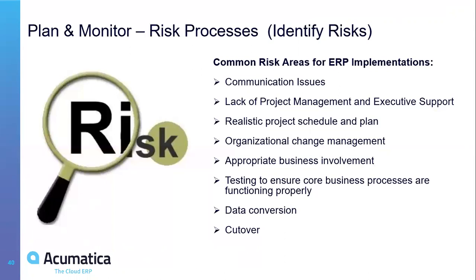If the schedule you create initially is too tight, the first slip somewhere will affect the overall plan. So focus on putting a really good schedule and plan together. And again, I'm repeating myself, I know, but I do it because it's so important. Agree it with the customer project manager and say, are you having your people available 2 weeks in October so that we can do the training, yes or no? Do this from the very beginning.